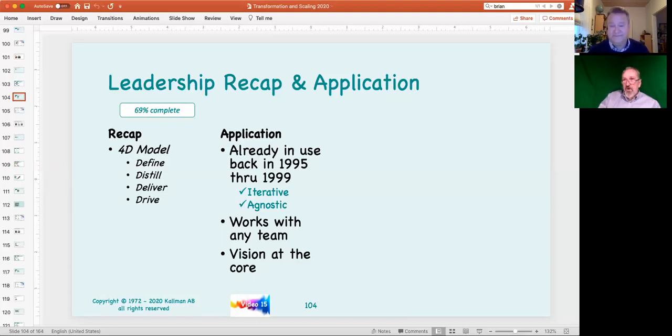So we went through it, got the things clearly defined, what a fully workable order was, and trimmed that delivery cycle down from 5 weeks to less than 5 days. So it had huge cash flow implications on the business, but it's one of those words.